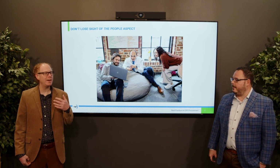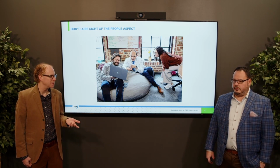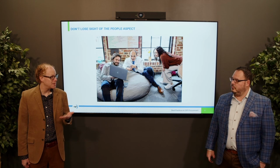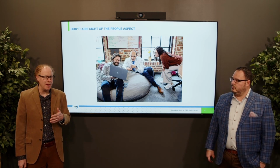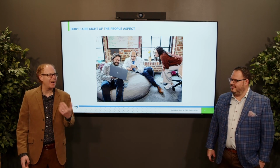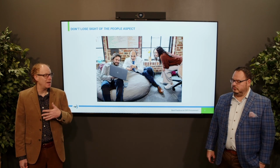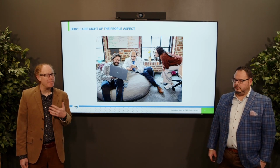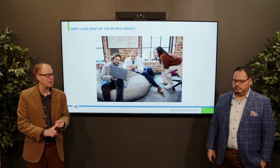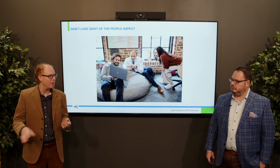Yeah, if we can't guarantee who the implementation team is at the point of RFP, how do we understand the talent pool that the partner brings to the table? Obviously, representative bios and maybe even interviews with some of the key resources are important, but that might only tell you who the top 5 or 10% of your implementers are, and the team is not 100%. So take a look at where the depth is. Where is that organization based? Do they use offshoring? What is the average tenure of their employees? Or are they using a lot of contractors or external resources to do the project? What's the average industry experience of the overall implementation team?